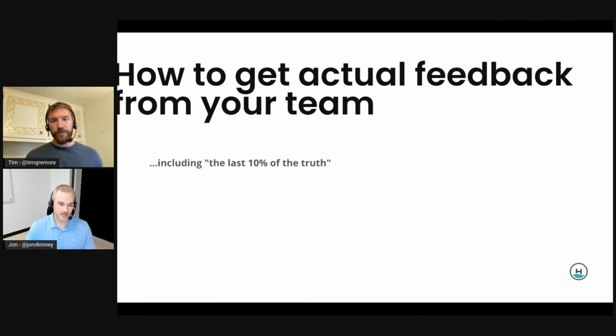Yeah, and much like Lead Honestly is a great asynchronous text-based complement to an in-person one-on-one, the Project Health Scorecard is a really great end-of-week complement to a bi-weekly retro. The retro is on video, where it's getting transcribed, so to speak, as people type into Notion. But that only happens every 2 weeks. So to shorten the feedback cycle, every Friday as you submit your timesheet at Headway, we ask you to please fill out the Project Health questionnaire. That way, if midweek we need to pivot for a backlog groom because something got funky, it gives us the opportunity to intervene and potentially keep the sprint on track.